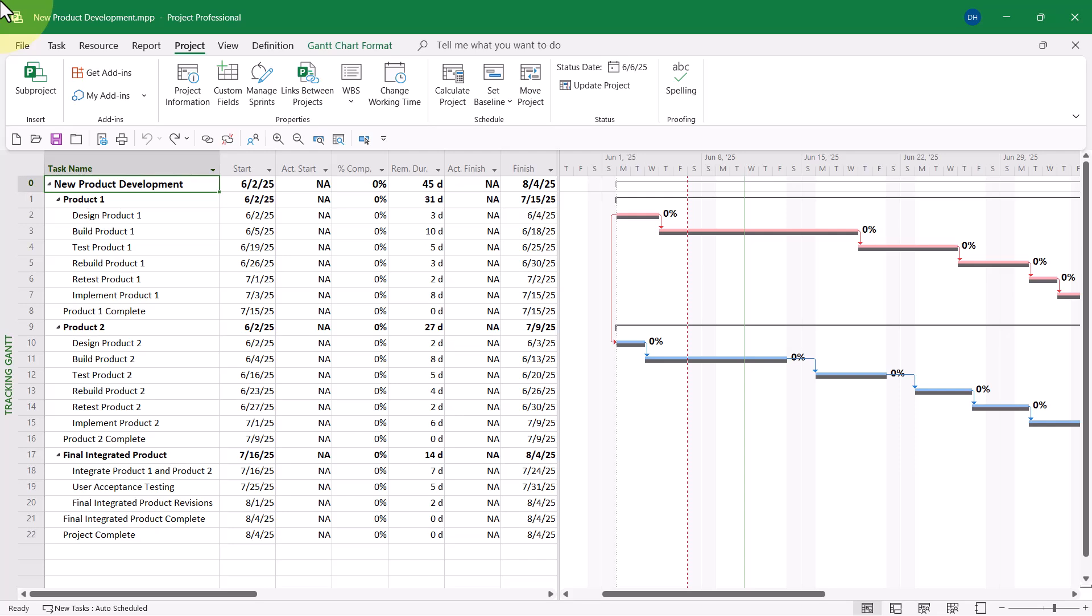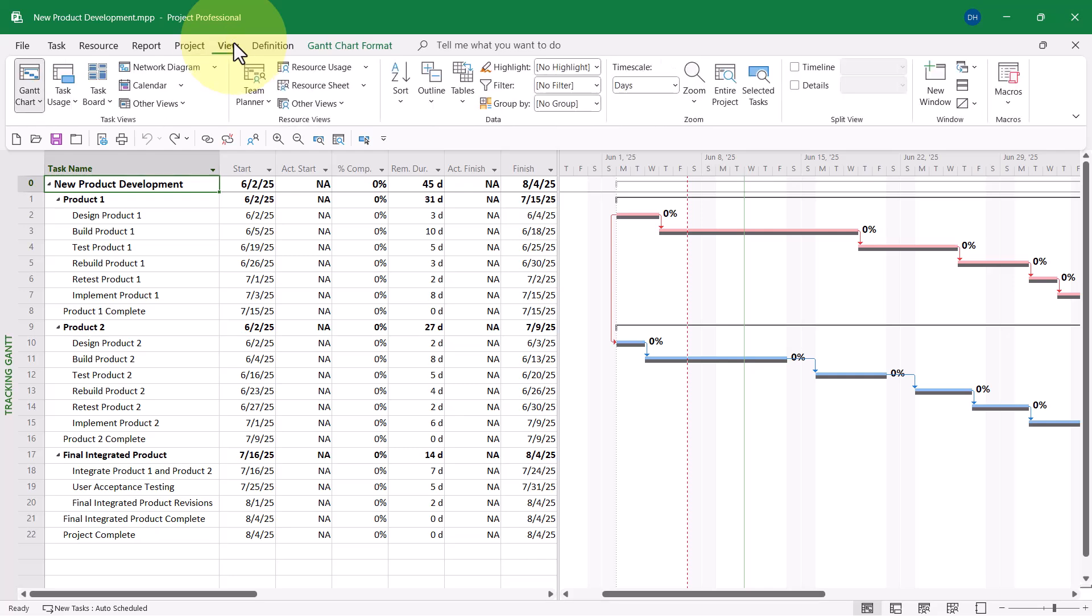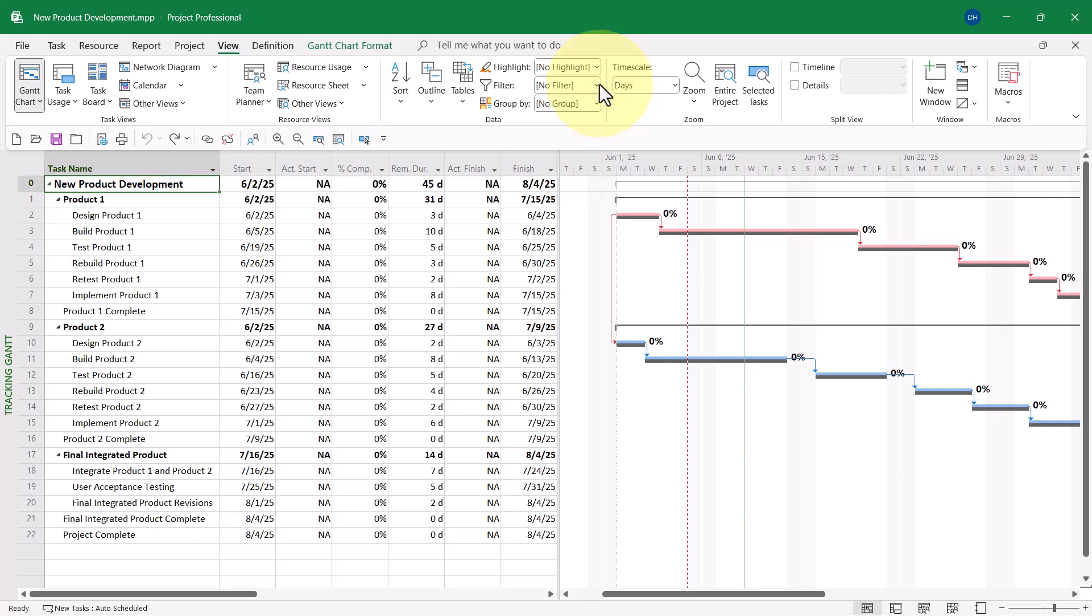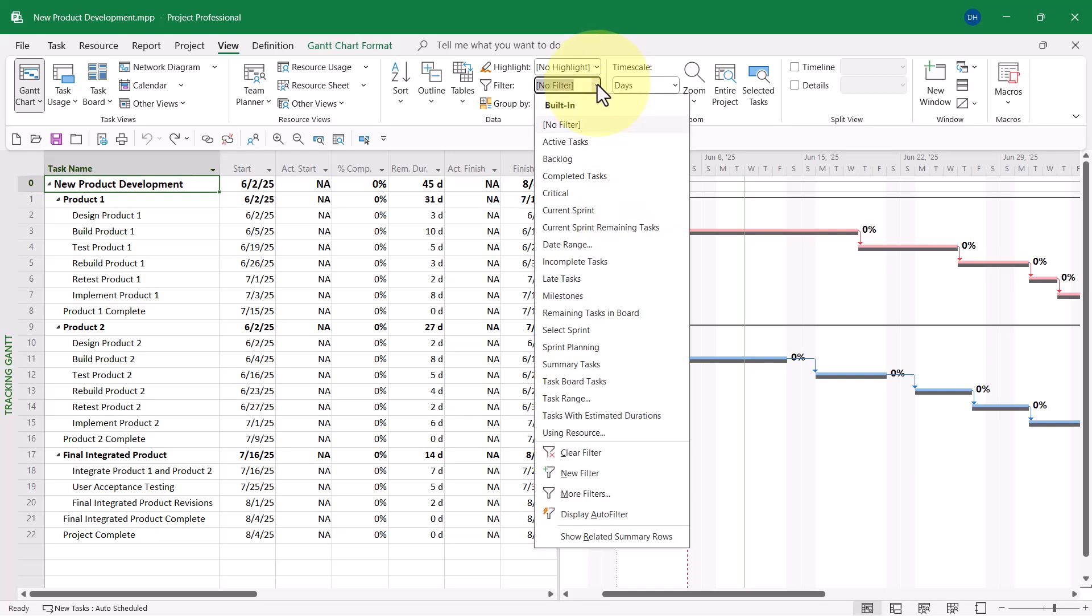Now, once you've set the status date for your project, then the next step would be to apply the Late Tasks filter. To do this, click the View tab to display the View Ribbon. Then, in the Data section, click the Filter Pick List button, and you'll find a built-in filter called Late Tasks. Select that filter, and here's where amazing things happen.